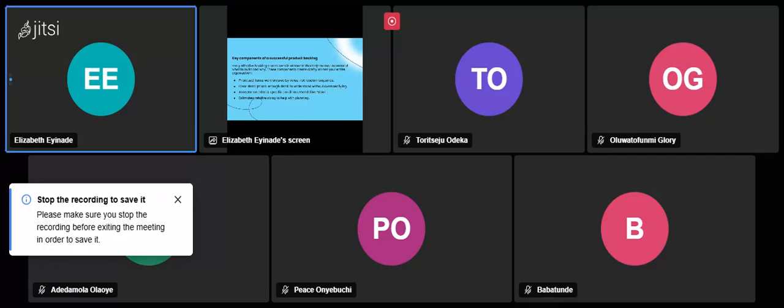Jira also has where you can input acceptance criteria. Okay, for the sign up field, our name should accept only alphabets. Numericals should not be accepted. Characters should not be accepted. So you need to define what your acceptance criteria looks like. That's a specific condition you are giving them to define this is what you mean by done.